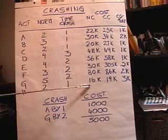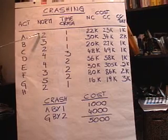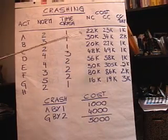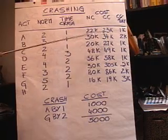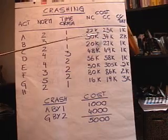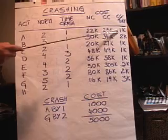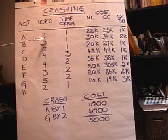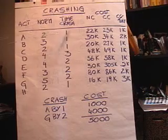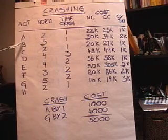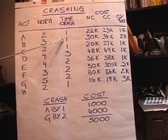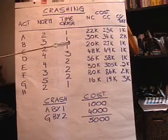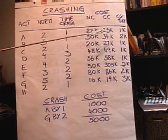We also have data about the normal cost of these activities. The normal cost is associated with the normal time, so activity A normally costs $22,000 to complete in two days. But if you want to crash it down to one day, it costs an extra $1,000 — it will cost $23,000. So the crash cost per day is $1,000, which is the difference between the crash cost and the normal cost divided by the normal time minus the crash time. On activity B, normally it takes three days but we can crash to one, and that extra two days costs $4,000, so the crash cost per day is $2,000.